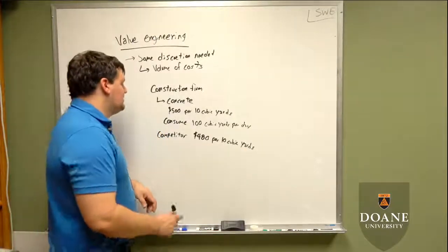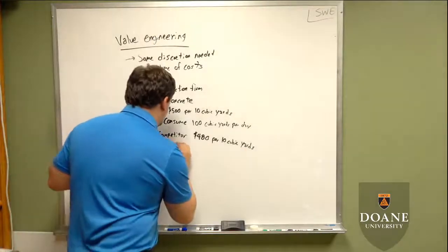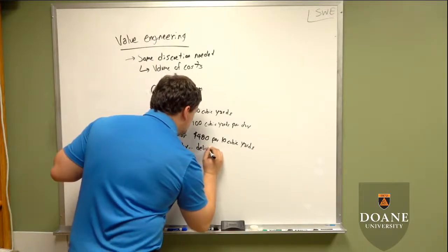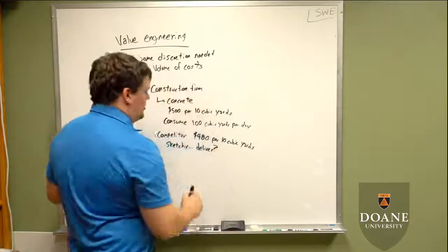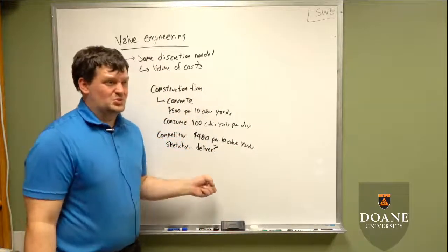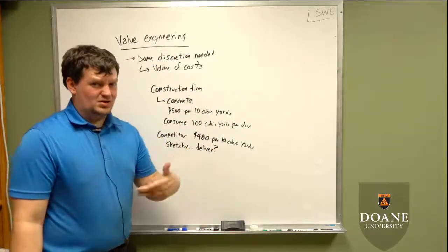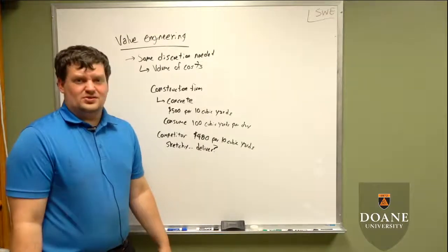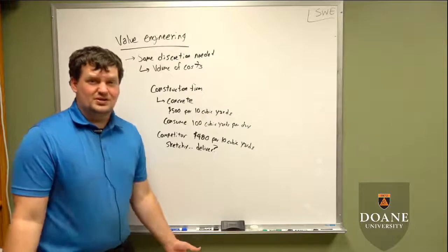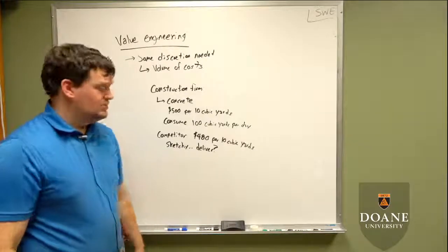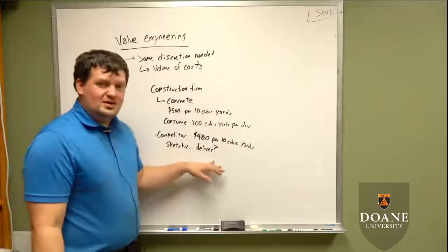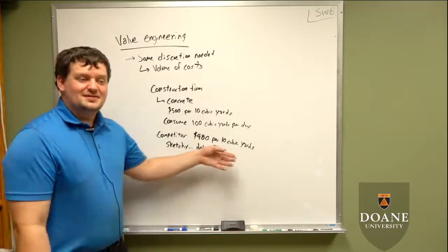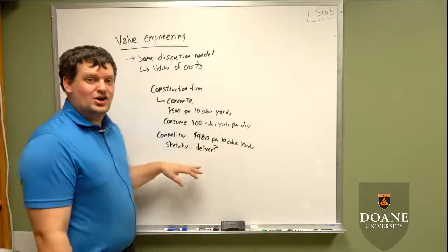Well, but this may come with problems. Can they deliver it on time? Are the drivers reliable? When they show up there, are they going to be drunk out of their minds? Are you going to be dealing with a guy who has no idea what he's doing? Is he going to be combative? Is he going to come at you? You save maybe $20 per 10 cubic yards. That may not be worth this cost.